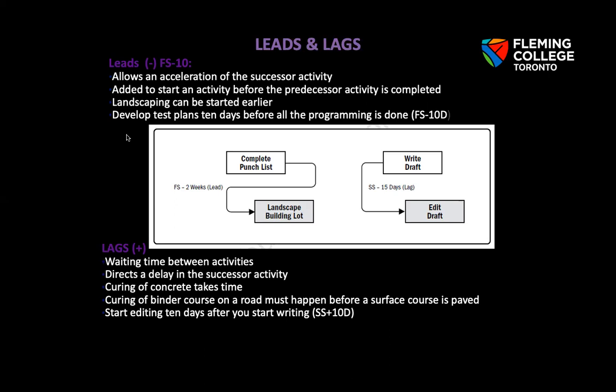And there are some mandatory dependencies. We call it hard logic, like contractually required or inherent in the nature of the work. You can't edit the content that has not been written. Correct? Yeah, that's right. You can't decorate the cake if it is not baked. These are mandatory dependencies. Okay.